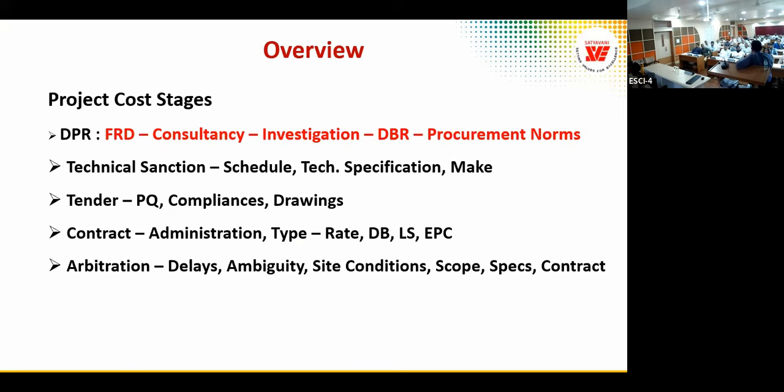whatever make, 3 makes is the minimum as per the procurement norm. We have to specify 3 makes, three brands. It should be more than 1 or 2. 3 brands, sir, because 2 can be a straight line. One is there. 3 in a straight line is difficult. I told you the simple way. That's why 3 people, 3 tenders. So 3 makes. Whatever make and product number we specify should be of equivalent technical value and equivalent commercial value. We have to have that proof.